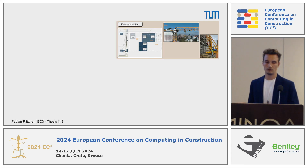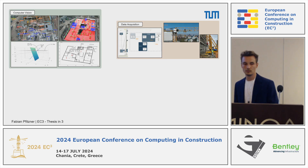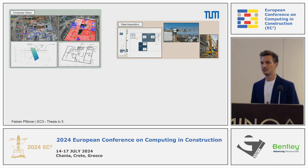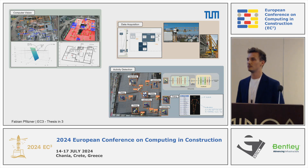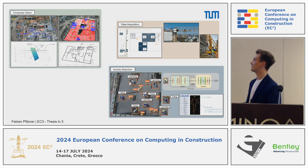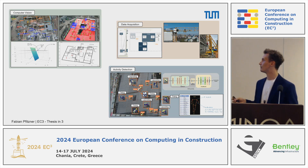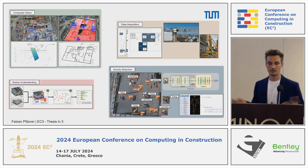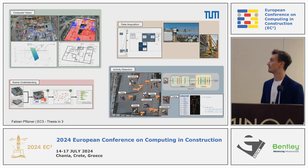This gives us raw data, which needs to be further processed using computer vision approaches like object detection, semantic segmentation, and projections. This gives us information about on-site resources, but not about the activities. So we need activity detection as well, by precisely looking at individual process steps — giving information about reinforcement work, for example, but also concrete pouring, using scene understanding.